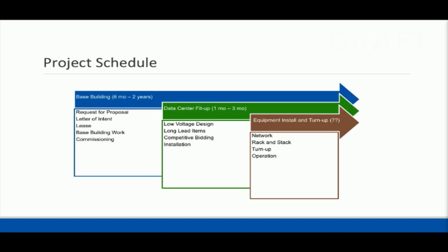It's 2 years or maybe 3 years if you're going to Poland to build one, where you have to go through land use approvals, you have to go through utility approvals, you have to go through a whole bunch of hoops before you can even start thinking about putting a shovel in the ground and building a data center. And yes, there are some places in the U.S. that are that difficult too, that go to those two boundaries.